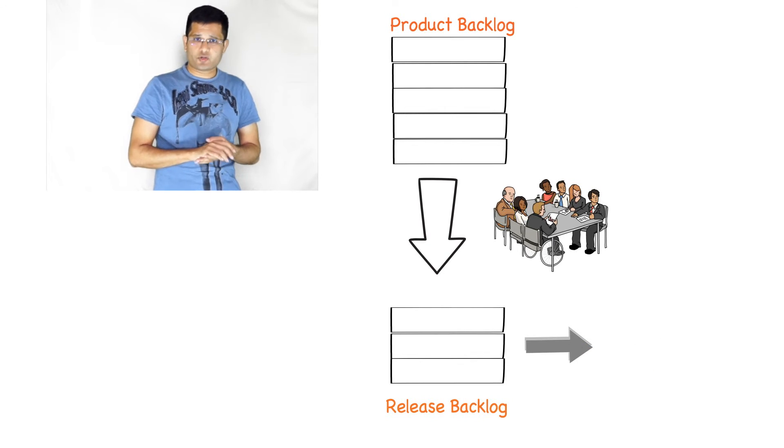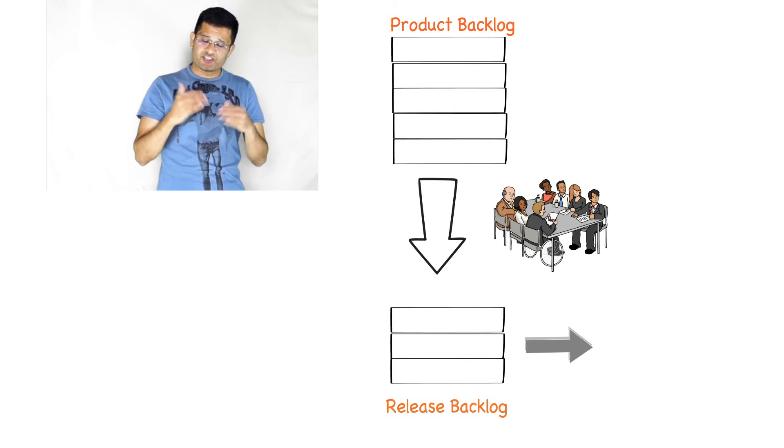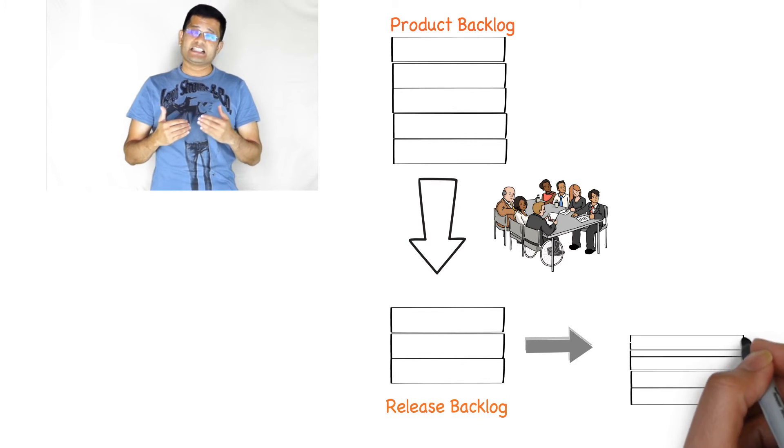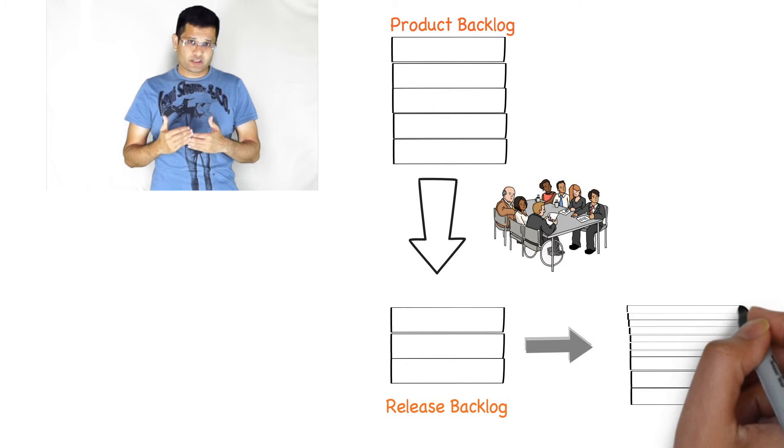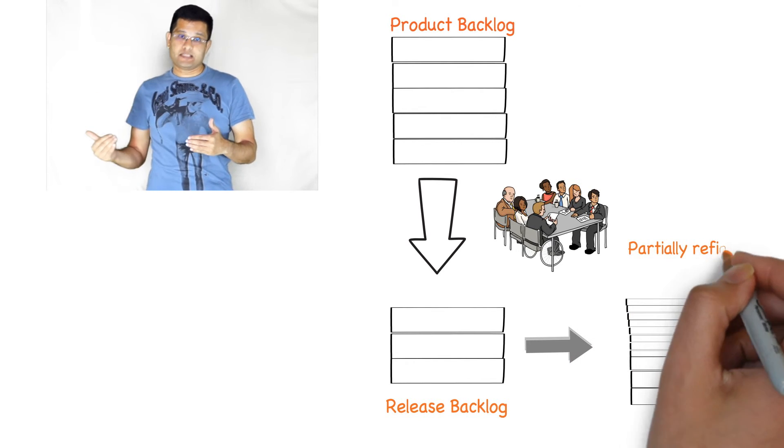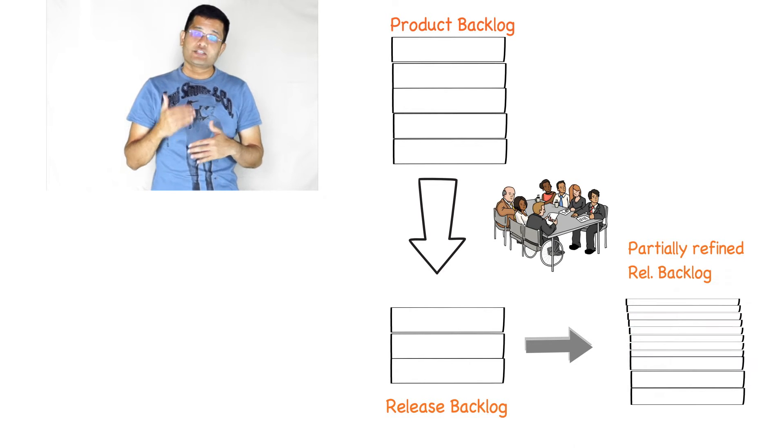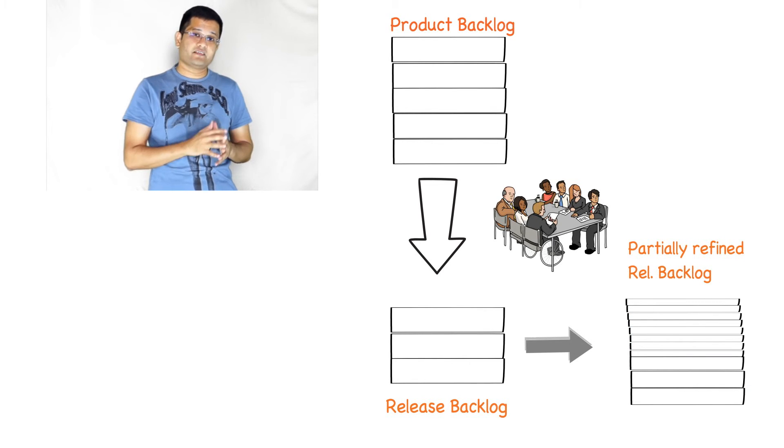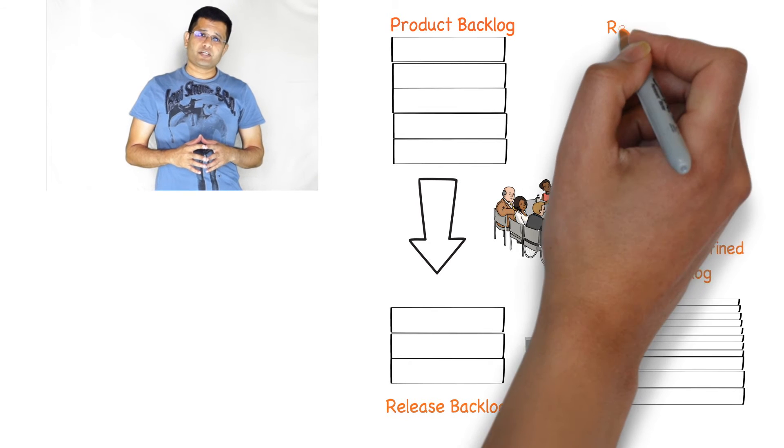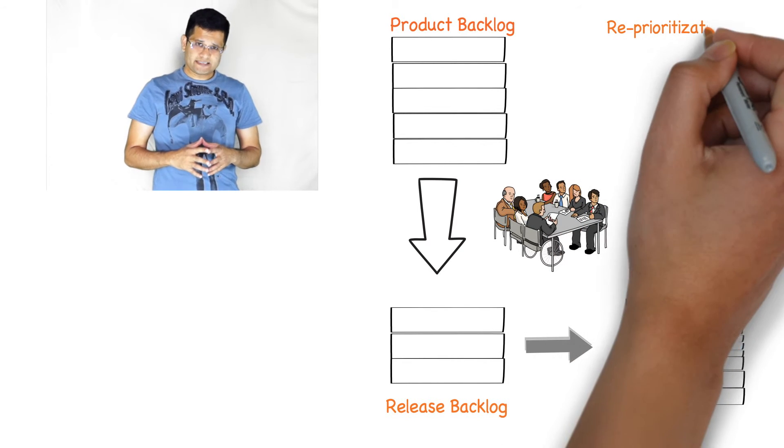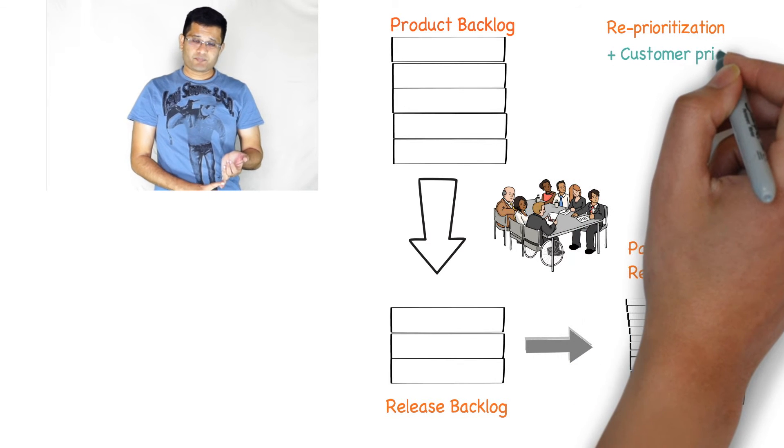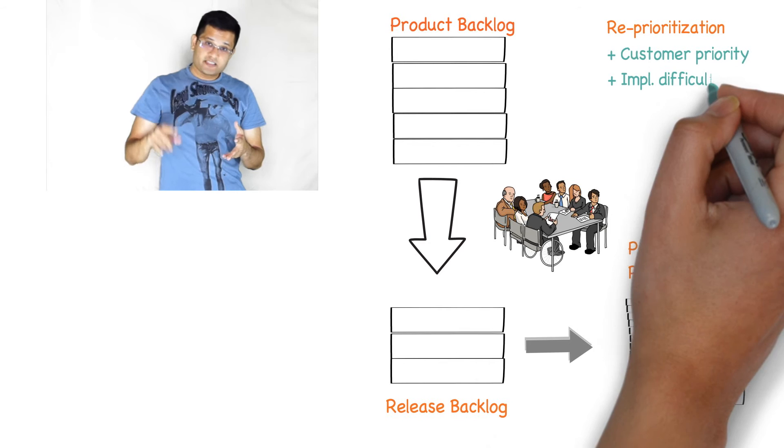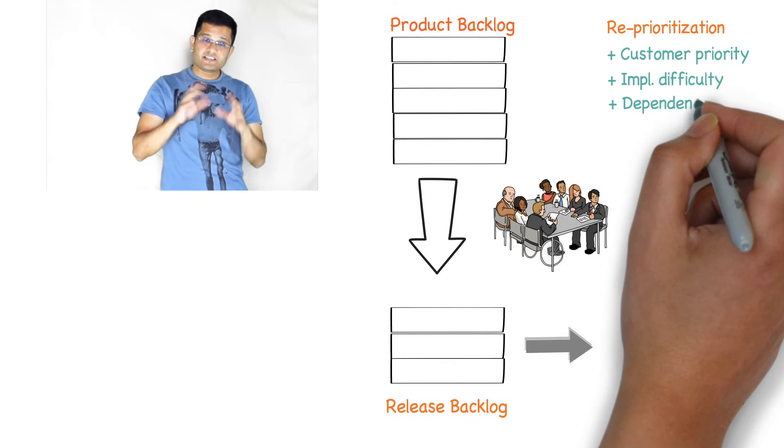During the refinement they may start adding engineering requirements which is required for them to implement, and this could also lead to a reprioritization of features within the release backlog. You would be reprioritizing those backlog items based on customer priority, the implementation difficulty, the dependency between features, and the urgency of getting feedback.